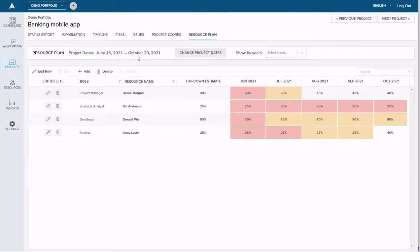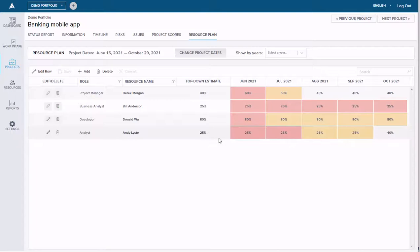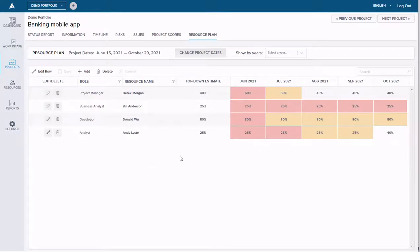For this project, it's only a few months long. We've got four key team members, and you can see we've got a top-down estimate. What Acuity is highlighting here is that for certain months, these resources are overutilized. At the individual project level nobody is over 100%, but this color coding or heat mapping indicates that these individuals are working on other projects that, in total, push them above a certain threshold — maybe 125% utilization.